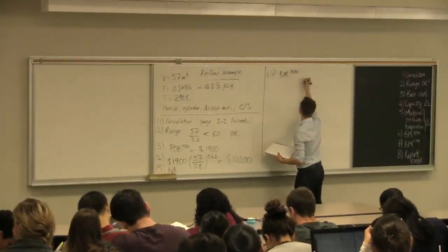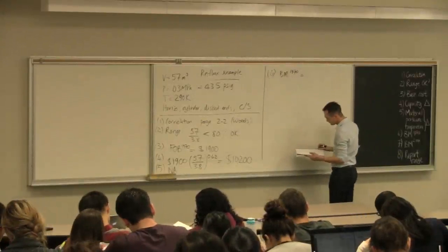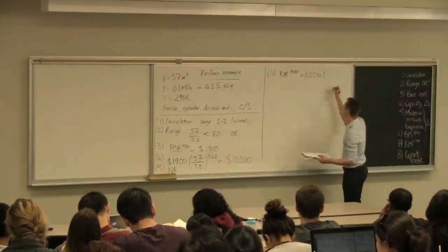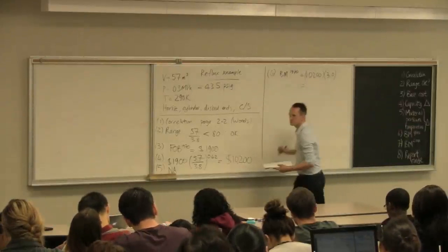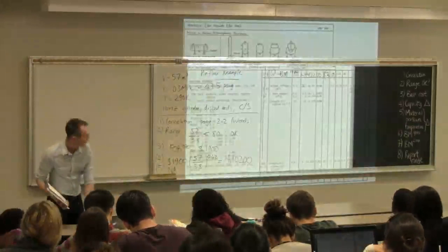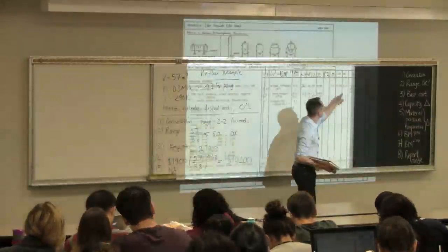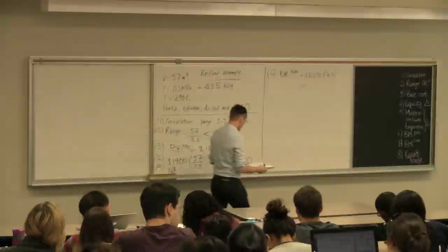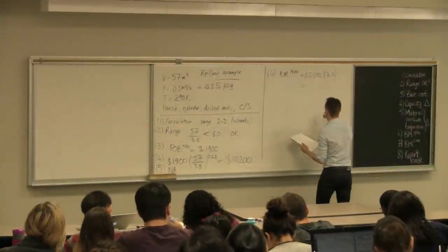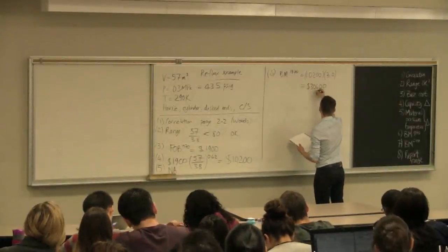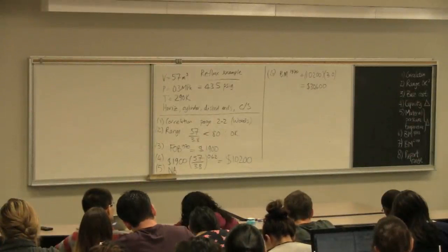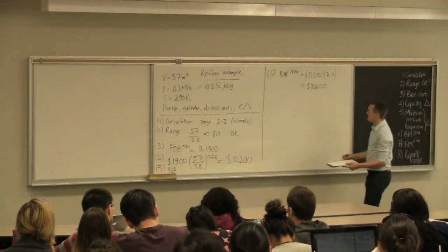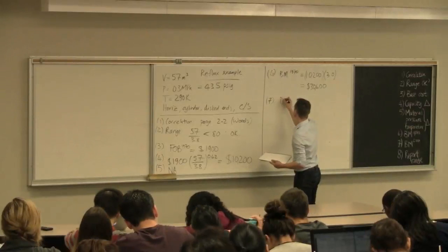So the bare module cost in 1970 then would be 10,200. And the bare module factor off that table was 3.0. So the bare module factor over here was 3. Cost would be 30,600. This is cost installed, painted, uncrated, inspected, all those things that go into the bare module that we discussed in the previous classes. And then the final step is to adjust this for inflation.